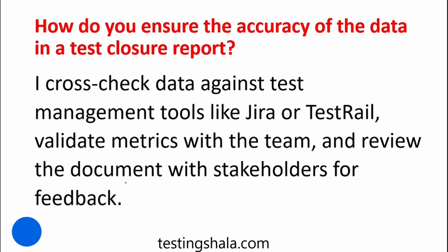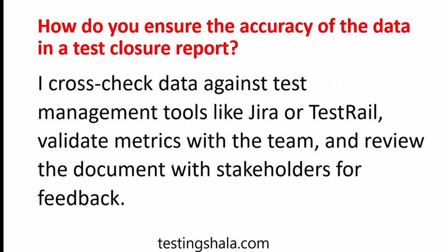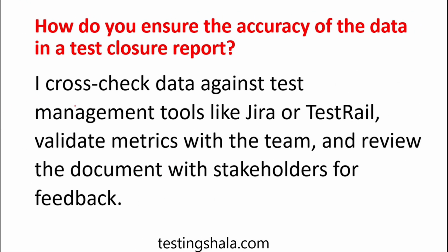How do you ensure accuracy of the data in the test closure report? The accuracy of the test report depends upon the data we get from test management tools like Jira and TestRail. Those get validated against the metrics with the team, and we review the documents with the stakeholders for feedback. In this way, we can ensure accuracy in our test reports.